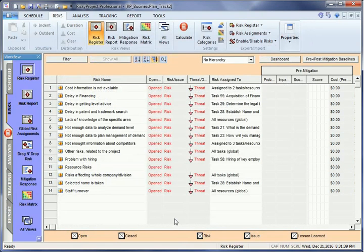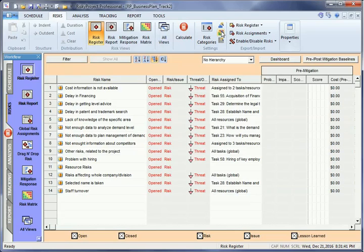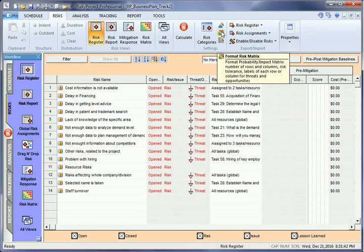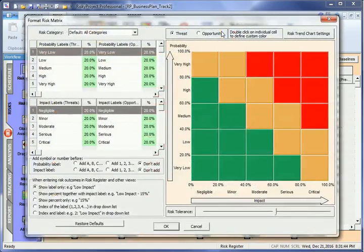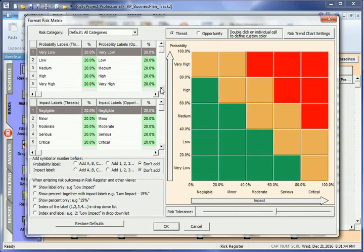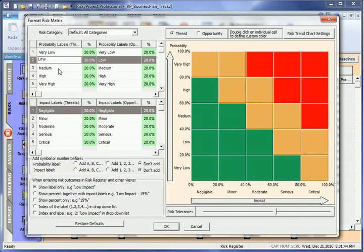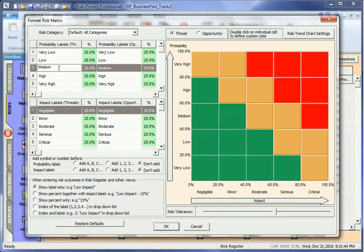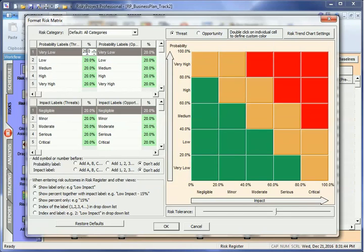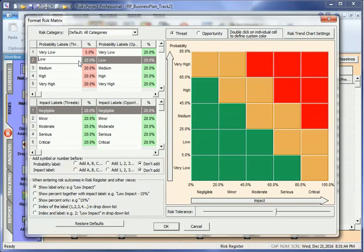You may want to customize the risk matrix. You can define intervals and their associated labels for all risk categories, as well as updating the number of intervals. The intervals can be uneven. For example, a very low probability of risk could be from 0% to 5%, while a low probability of risk could be from 5% to 15%.